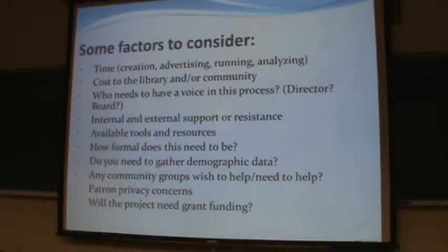How much advertising time do you want? Do you want this up in the community 2 weeks before you start the surveys and the assessment? More time than that? How long will you let the assessment run? Are you going to talk to people over the course of a month, a couple months, or is this lightning fast and you'll get a couple of people's opinions in a day or two and just keep moving? And after all is said and done, you have to spend time analyzing your results.